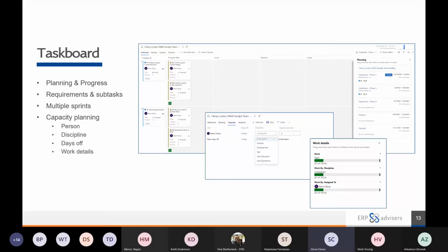And it allows you to specify individual or team days off within a sprint. So by configuring that stuff up as part of your sprint planning, what you're doing is you're setting a capacity over the duration of the sprint, so that then as you're adding work and assigning work to individual people, you can see where maybe you're assigning too much work, or indeed where you've run out of capacity and you need to stop. Once the sprint's agreed as part of your sprint planning, and you've got your iteration with all of the various requirements and tasks assigned within it, then you use the same board essentially for your team to manage their individual tasks by moving them across the board and recording the hours remaining on each of the tasks that they've got, and that then feeds into your burn down chart.